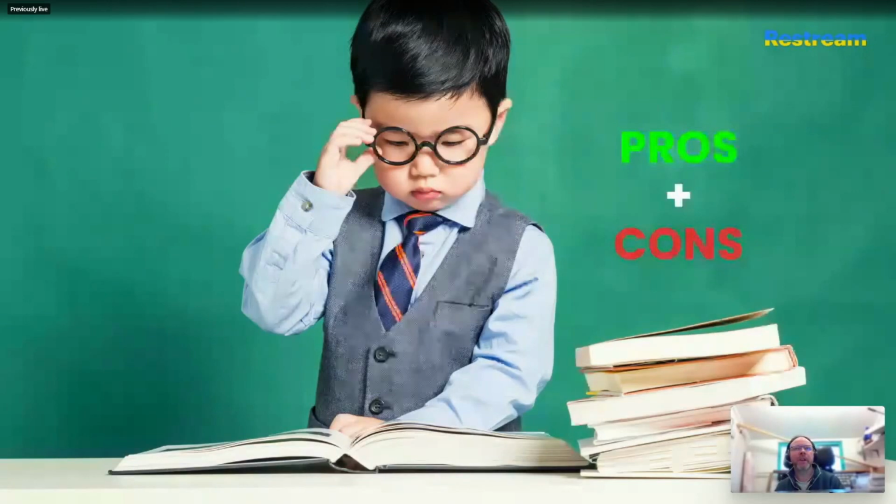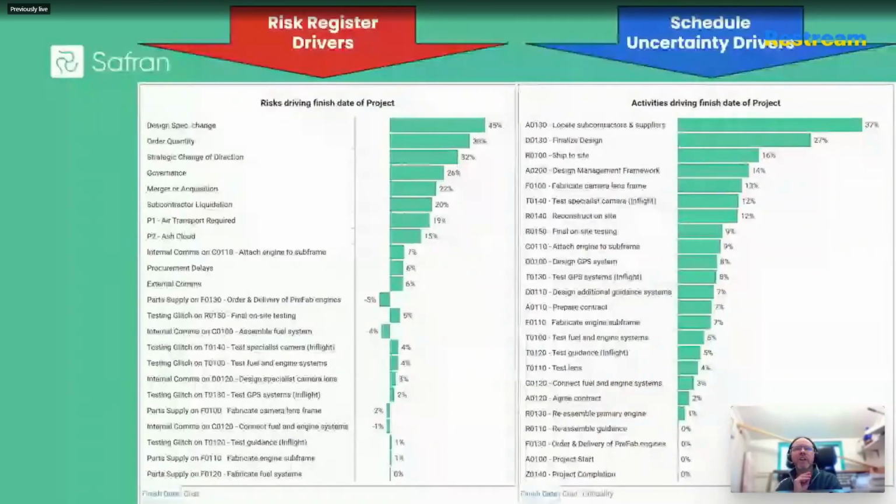So the first thing to note is that traditionally, Monte Carlo simulation applications are dealing with probabilistic ranges of outcomes, not definitive singular deterministic answers. And they typically spread these out across multiple reports. So here, say in Safran Risk, you can see how you can show your discrete risk events on your risk register on the left-hand graphic, whereas any embedded schedule uncertainty direct on the schedule is going to come through on the right-hand side. Now, this helps to reveal the full picture in a comprehensible way.